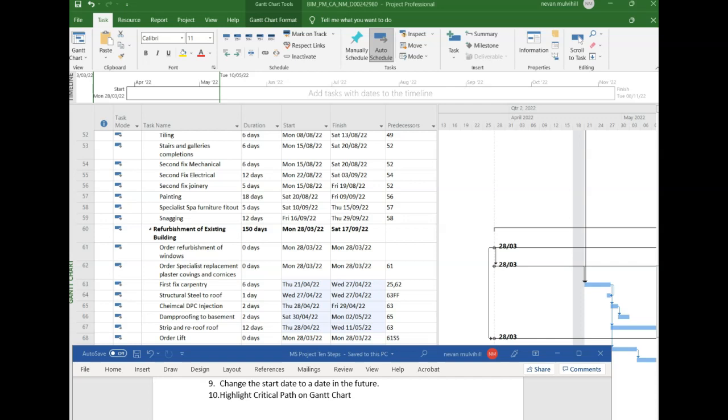And in that instance, you're looking at the critical path and you're saying, right, if I can shorten these durations by maybe increasing the gang size, increasing the number of people working on the job, only on the critical path items, that will save time. It'll probably cost extra money. We spoke before about the triple constraints model where you have time, cost, and quality, and how an impact on time will have an impact on cost, etc.